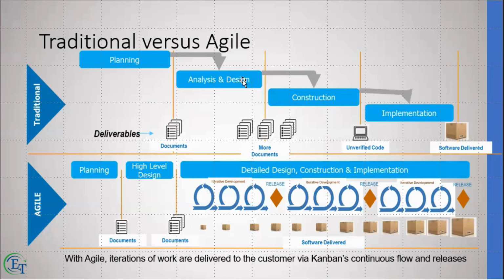And probably at the end of this 2-year process, the business would then say, this is not exactly what I want, or there are certain major changes I need to this software. And had I seen this earlier, probably I would have given that feedback. So this SDLC process did not work so well. About 70% of waterfall projects actually failed in one of these phases at some point in the life cycle.